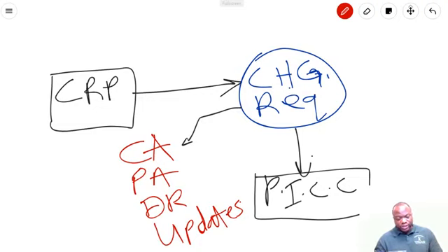It says when issues are found while project work is being performed, change requests can be submitted which may modify project policies or procedures, project or product scope, project cost or budget, project schedule, or quality of the project or product results. Other change requests cover the needed preventive or corrective action to forestall negative impact later in the project.